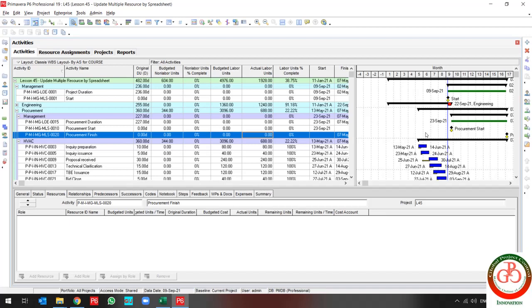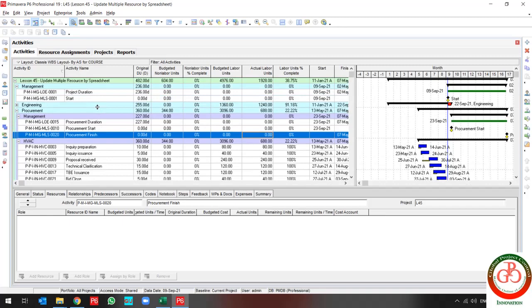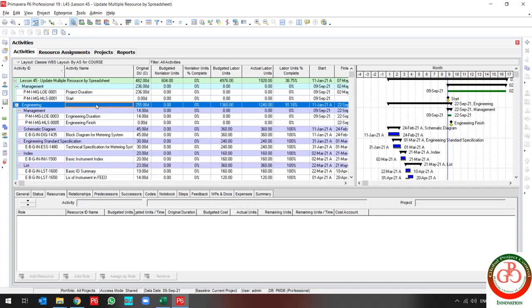That is all you need for multiple resource updating during the project. I avoid any update for milestones and LOEs because you may face errors during this update. After you update your resources, you can easily update those two.